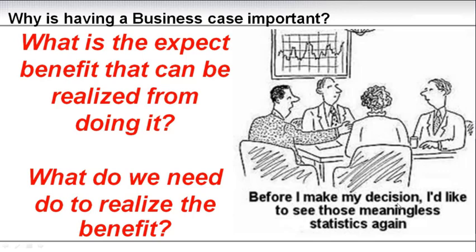Not just are we solving the problem, but we're also providing an additional benefit by doing the project. And then in most cases, doing the project is not the answer. There needs to be additional steps or tasks, actions that need to be carried out in order to realize the benefit that the project provides. Example, you are implementing SAP. You will have a best practice tool, and the SAP will replace an old, outdated financial system or logistics system. So that is the objective, and the benefit is that SAP will provide you the best practice process.